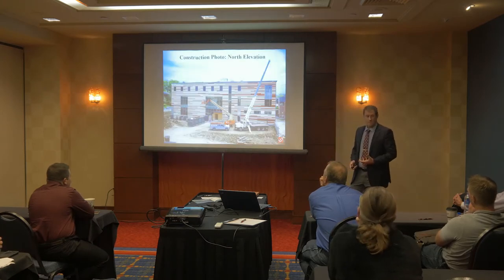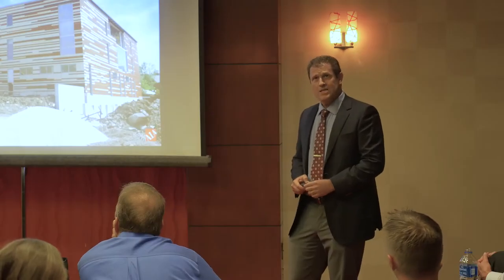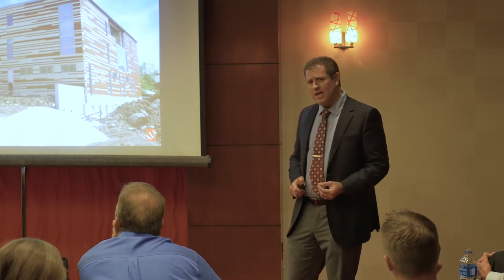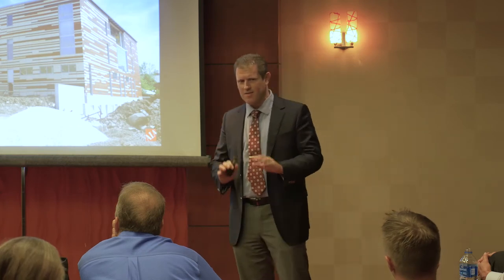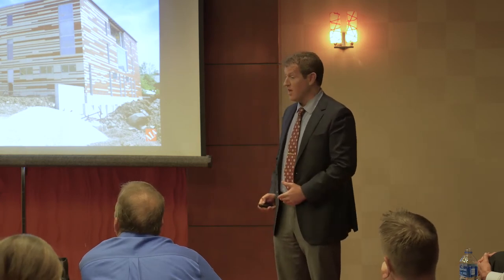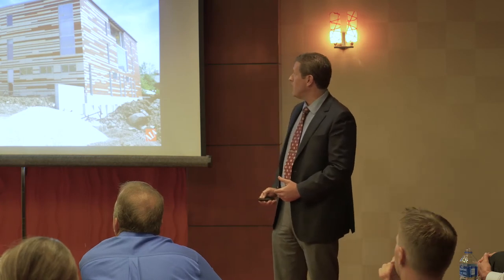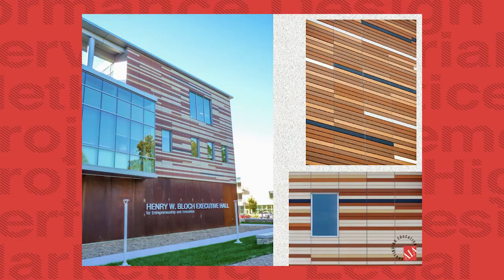How many days did it take you to settle the panels? We did roughly, I want to say, maybe 8 panels a day on this one. We've done more before, but this was a different process. J.E. Dunn Construction, it was actually their self-perform group that did the installation. They were obviously a full partner on this as well. Here you can see that shadow effect. And then crossing the finish line, some completed project photography.